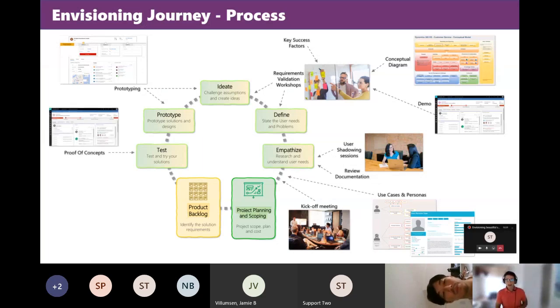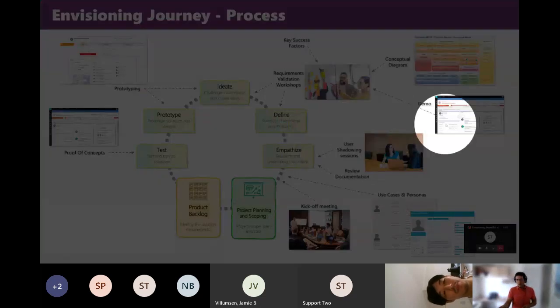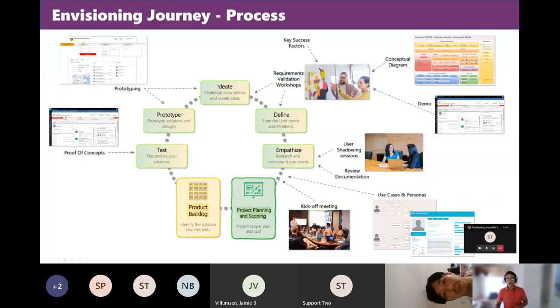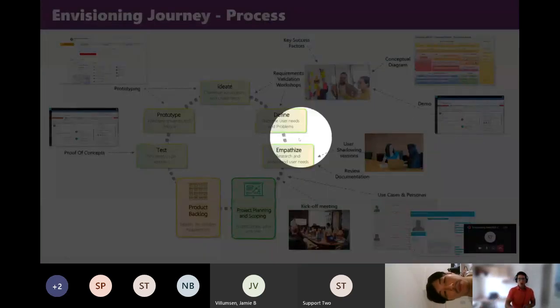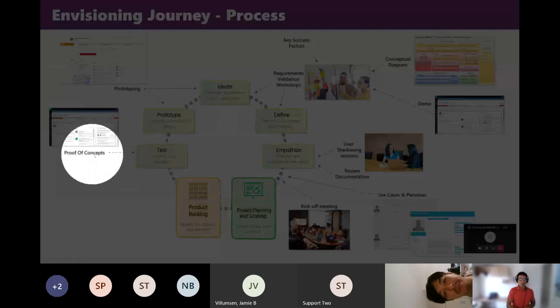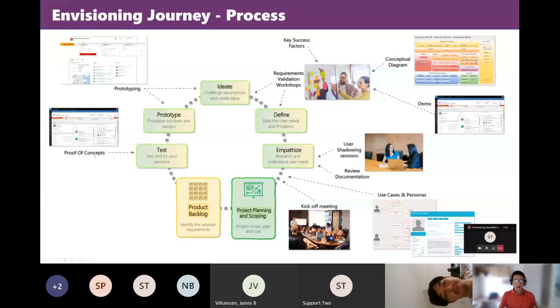And then, as I said, you start from a demo. Those are the first sessions you have, probably using a simple vanilla demo from a sandbox. Then as you go through that process, you can build a proof of concept, where, again, in a real sandbox you adapt fields, forms, and so forth, so that you can get feedback on what the client is telling you during the workshops.